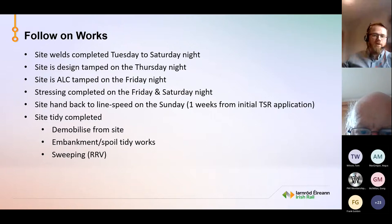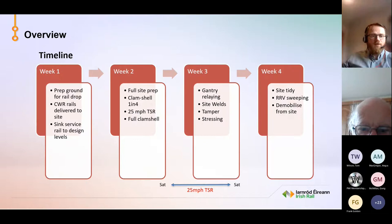So following that, we've our site tidy completed. So although with the gantries we're not getting as much done as with the panels, we only have our TSR on for 1 week. So in terms of dealing with operations and our TSRs and working within our TSR minutes, there are advantages to using the gantries. The timeline then, so say in week one, we prep the ground with the rail drop,